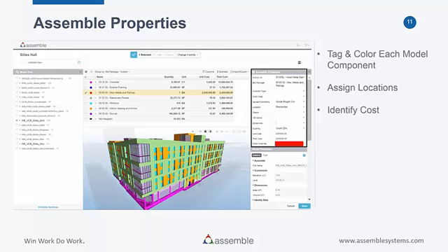So, talking through what you just mentioned there, if you have a total cost coming from a subcontractor for a group of scope, you can group by that subcontractor, plug in that total cost, and then reorganize it by area and see the breakdown based on the quantities in each of those areas. So you have a lot of flexibility to do some high-level analysis across your project.